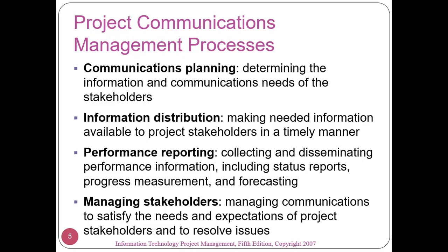Number three, of course, is the performance reporting. The output of this process are performance reports, forecasts, requested changes, recommended corrective actions, and updates to the organizational process assets.